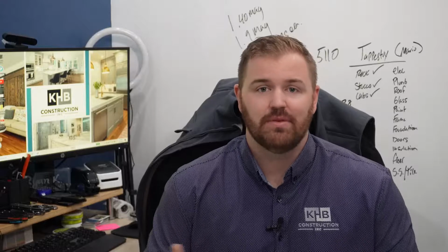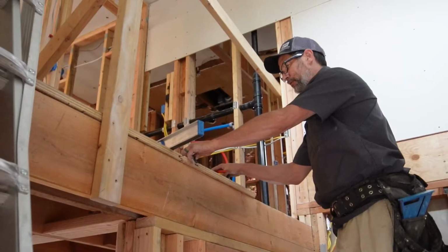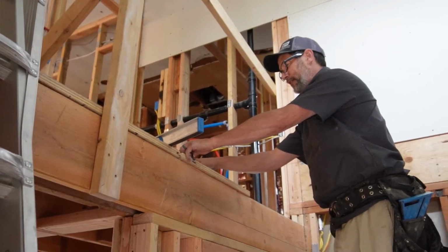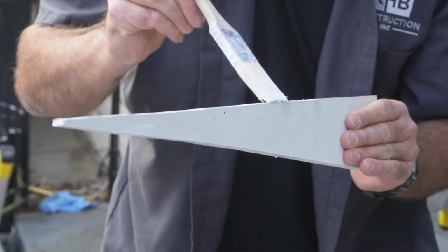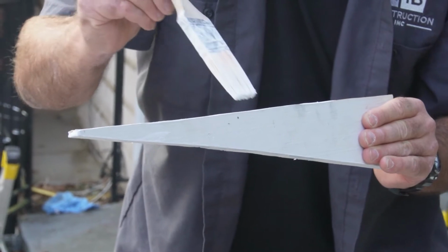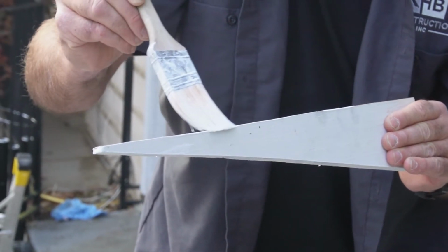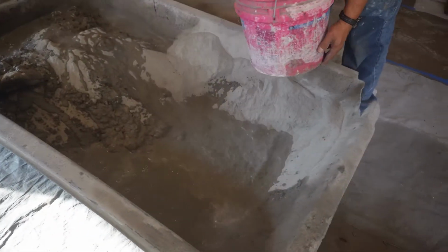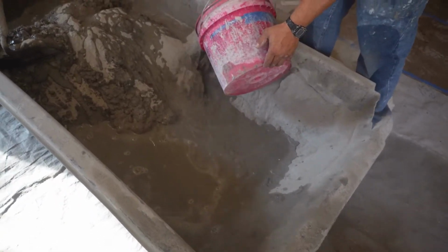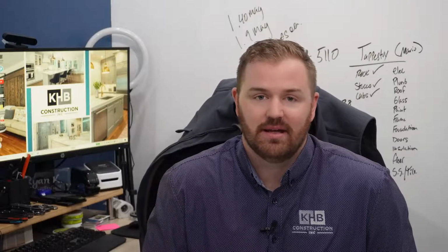We have to adjust those other schedules, talk to those homeowners, let them know, hey, this happened, we're gonna be a guy short, or we're gonna have to push you a day for start time on your project. And that causes them issues. It costs you more money because we have to do a lot more logistics on the schedule to get it mapped out.